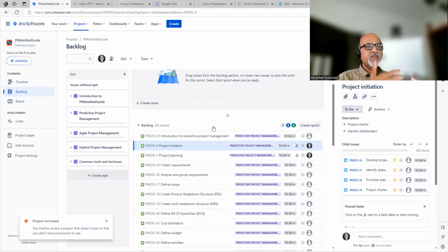When the team is sprinting, the product owner will get time to do this grooming for the upcoming sprints. This is a very important activity performed by the product owner. A product owner owns the product backlog, refines it, sequences the entries, does high-level estimates of the entries, then does the fine-tuning, then defines the activities.